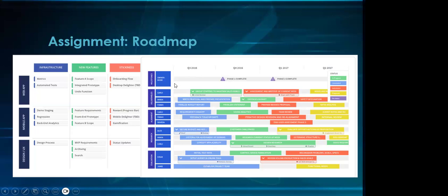Then your footer, is that going to be something that started in sprint 1? If you think about what has been done already, if not, maybe it starts at sprint 2. Then I would draw my next arrow starting from sprint 2, and that will end at the end of sprint 2. Then I will go onto the next epic, whether it's to do with the cart feature or the shopping feature, or if it's to do with policy, whatever the feature or the epic is. Then I would space them out, and they'll be overlapping. Remember, this roadmap is a live document, it can change. It's not necessarily set in stone.